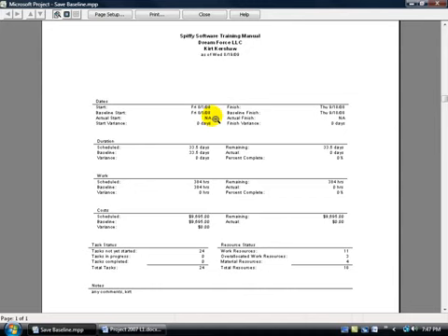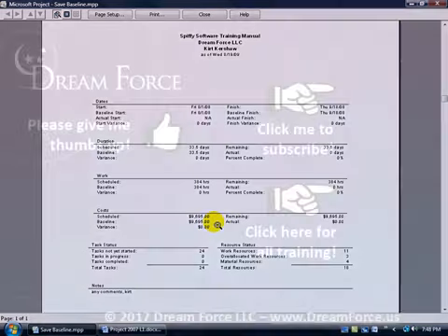And then you have your actual start date. So as the days start moving along, if you begin August the 2nd or the 3rd, you will have your actual start date here. So you have a comparison here. Your start date, your baseline, and then your actual. Aside from your dates, you have the duration, you have your work, and then you have your costs. What you've got scheduled, a snapshot of that scheduled before you actually start the project, and then if that schedule or that variance from that scheduled or baseline comes in either under $9,000 or over $9,695, you've got it here.